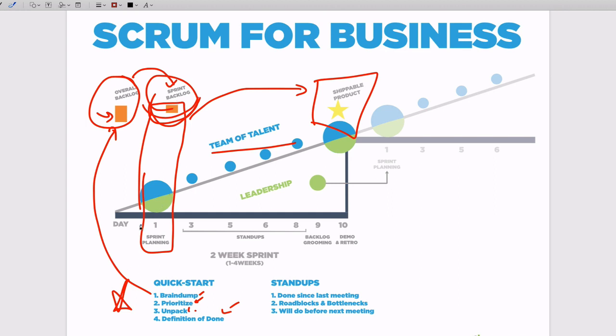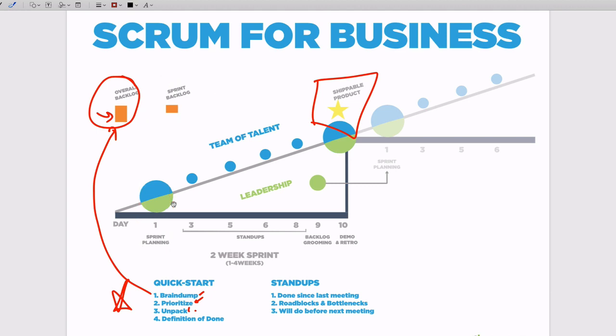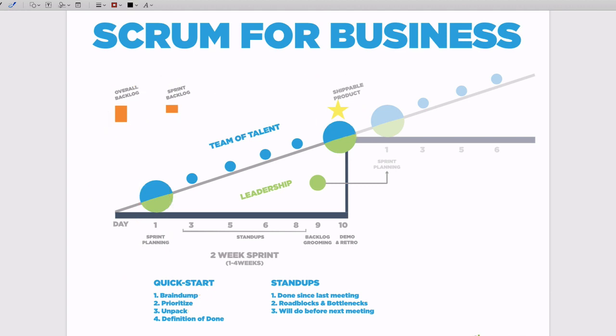Okay, great. So now that we've got all that committed to, then what's going to happen is we're going to get to work, right? And so the sprint planning happens here. And that's where we come up with our sprint backlog. And a lot of teams will do a stand-up every morning. This stand-up is short. It's like 1 minute or less per person. Usually a Scrum team is no more than 9 people on the highest side. Usually around 7 is usually the balance.